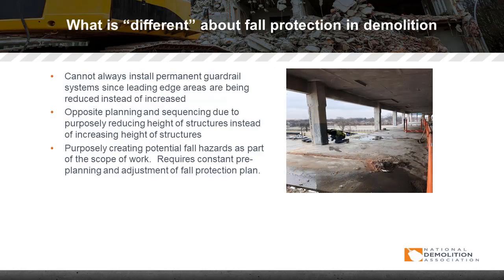What is different about fall protection in demolition? You cannot always install a permanent guardrail system since leading edge areas are being reduced instead of increased — you can demolish the structure from the outer edge working your way back, so the leading edge is actually disappearing, not increasing. As such, opposite planning and sequencing is required as you reduce the height of the structure. Purposely creating potential fall hazards as part of the scope of work requires constant pre-planning and adjustment of fall protection plans.